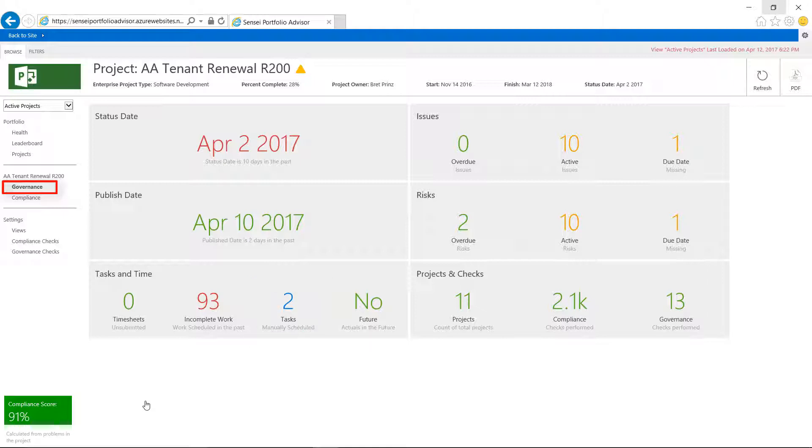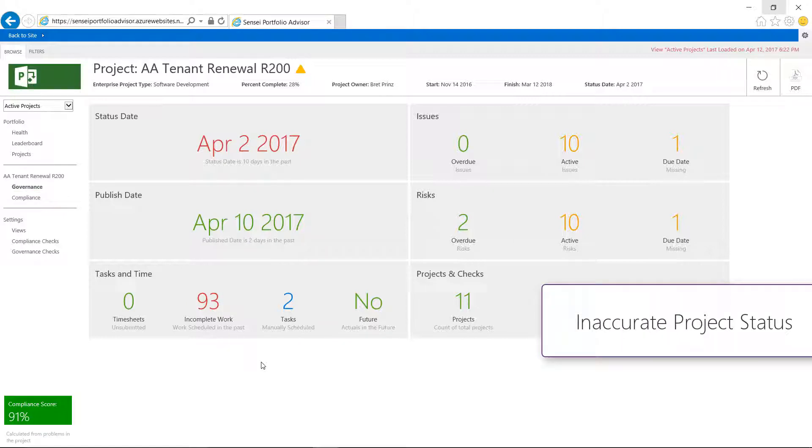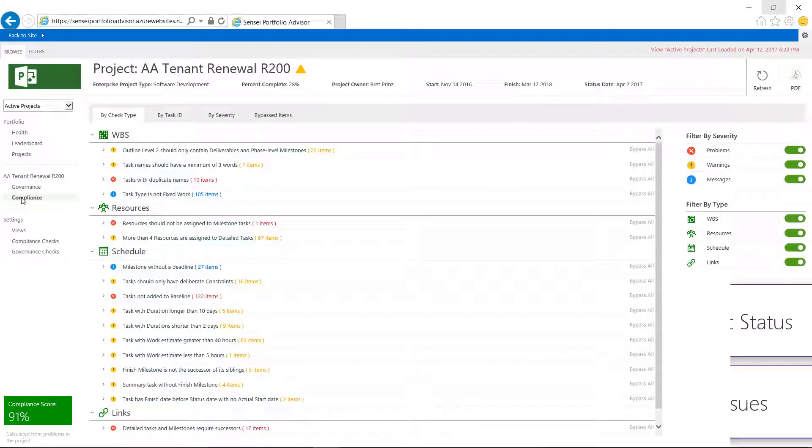As a project manager, I need to pay attention to these exceptions and start to chase down unsubmitted timesheets and reschedule incomplete work into a future reporting period, and so on. Otherwise, my project status is not accurate, and we have data quality issues.